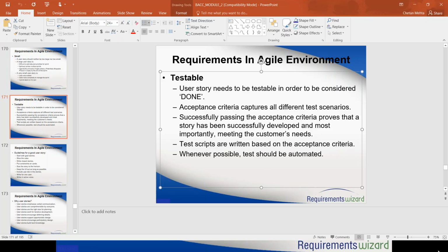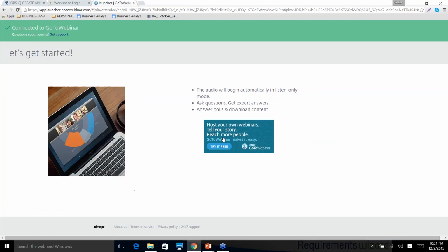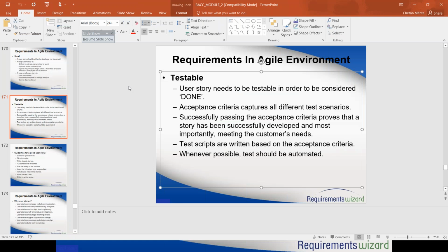The sprint planning is all about how many user points we can do in that particular sprint, right, Chetan? Yeah, that is a topic we need to discuss in detail. Velocity, that is called the velocity of the team. Have you heard of this term? Yes. So velocity is the capacity of your team to handle the number of story points you can do. And yeah, we'll talk tomorrow on that, because tomorrow I need to cover the sprint planning and the burn down and burn up charts.